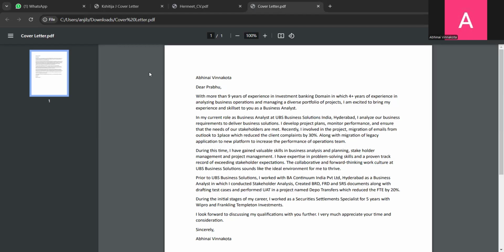Before starting the sprint, we will not make sure that every item in the product backlog passes the DOR. We only should make sure that all the backlog items which we are moving to the sprint backlog have passed the DOR.